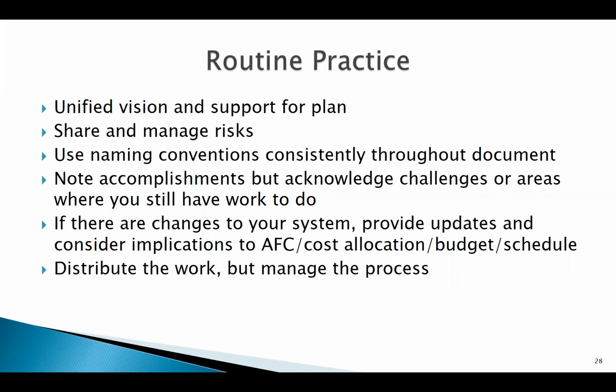When we see those kinds of things, it actually provides comfort to the Children's Bureau because, A, we see you have an understanding of what the risks are on your project, and B, that you're being honest with the Children's Bureau about what they are. And then also you have a plan for managing them. We get worried when we see APDs that don't talk about any risks or challenges. If we get an APD that says everything is wonderful, we look at that and say, is that a CCWIS project? I mean, we expect that there will be issues.